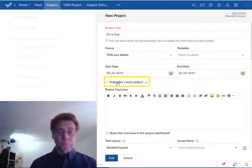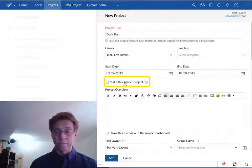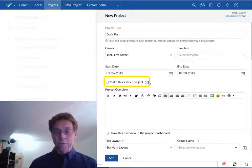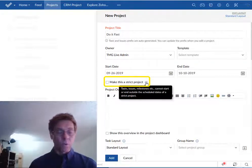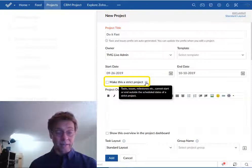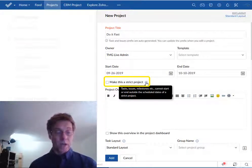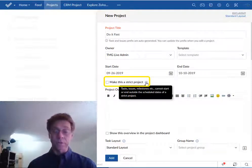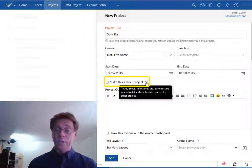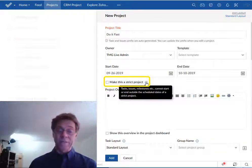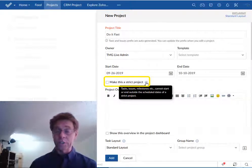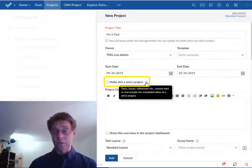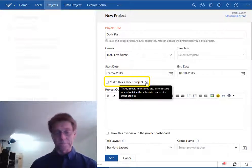This brings us to the option of making this a strict project. If we check this then Zoho won't allow you to schedule anything including tasks, issues, or milestones beyond the boundaries of the start date and the end date. Checking this box might help you keep your dates tighter but that also means there's less flexibility. So use this with caution. My suggestion is initially probably don't check it.